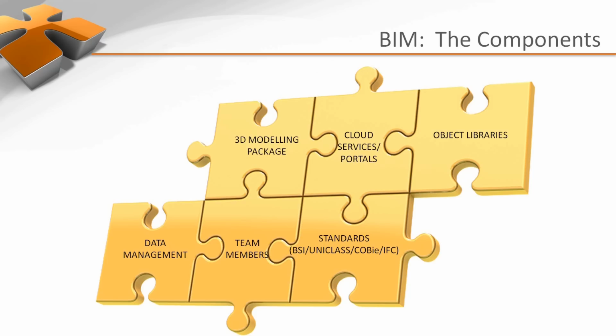The second one is that you have to exchange all information on the project electronically. And thirdly, that you have to have a CDE, or a common data environment, which basically means you need to settle on the project on some sort of information exchange, not firstly the standard you're going to use, but also the common data environment. And that's where some of these elements come in.